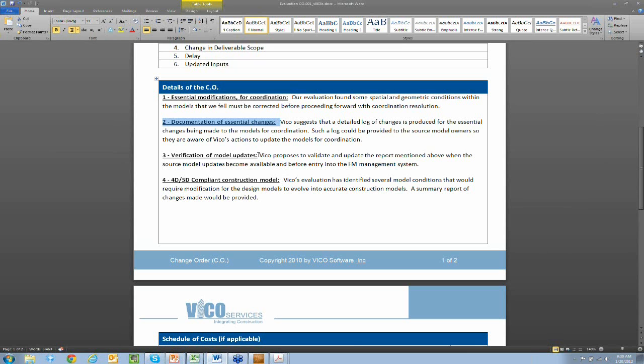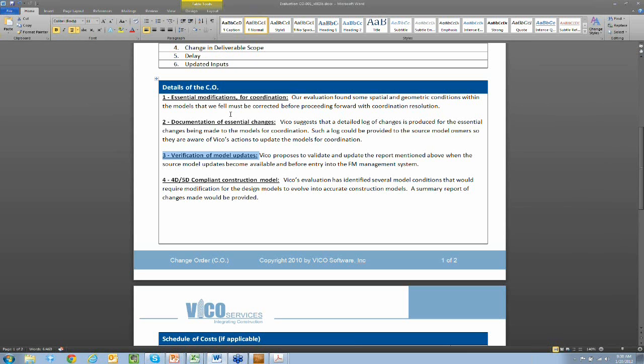After that, we have a service where we can do the validation of those updates. So if this information is going to be published to your facilities maintenance software, if some changes need to be made for coordination to accurately reflect the construction model, those changes should be updated in the original design model before we all publish together to the FM database. We're able from the very beginning to price that evaluation. And that's a really quick process, but once the model updates are done, we just use our own report and go through and make sure that the changes match the assumptions that we've made.